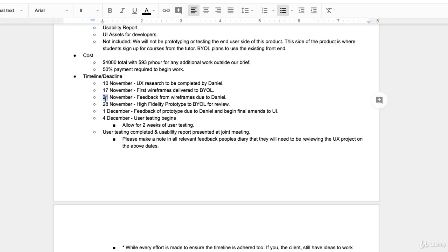So be really rigid at the beginning, saying that, yep, it needs to be here by this date, and as soon as they're late, add that to the time and push that out, because this is going to look long if it pushes over to the next year, as it adds another couple of weeks in the middle over Christmas. So we should have been handing this over mid-December, and before you know it, it's February. And they had in their head middle of December. So just be very clear about timelines and deadlines.